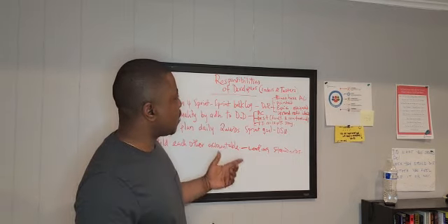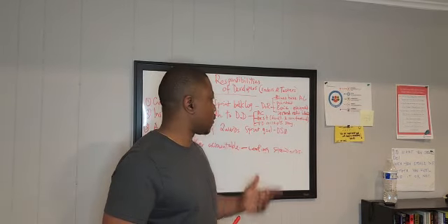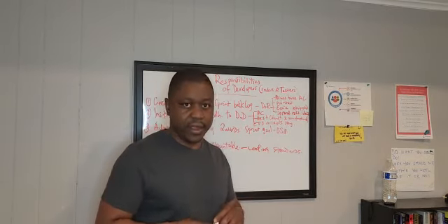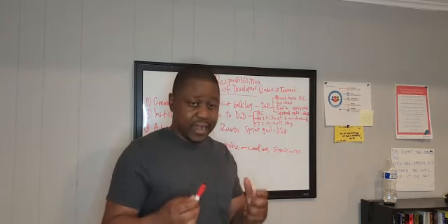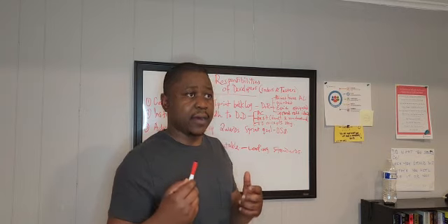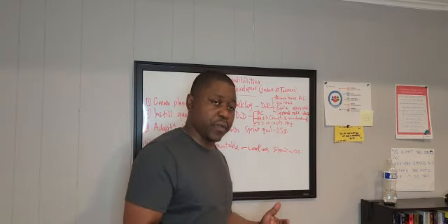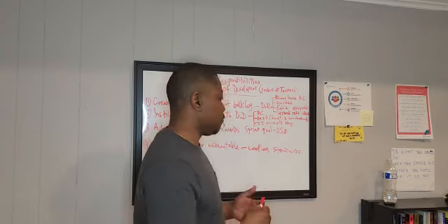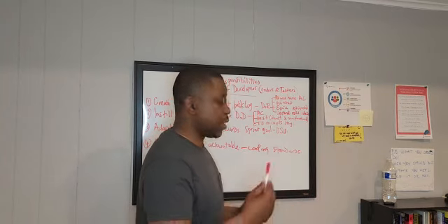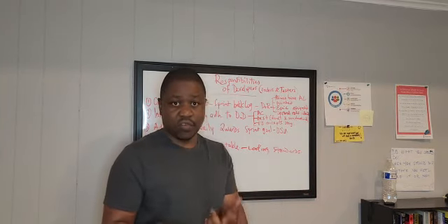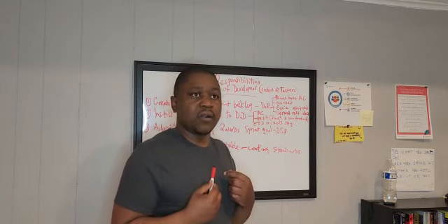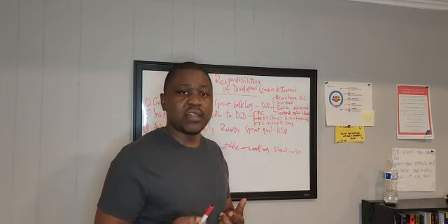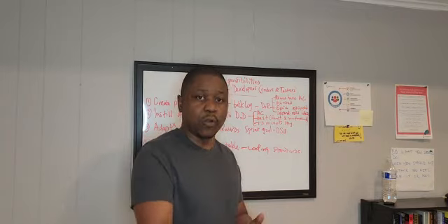So number one, these stories should have what? An acceptance criteria. It is in the interest of the developers to know exactly how the success of each user story will be checked after it's been coded, so that they can understand if they were successful in delivering on that requirement or not.